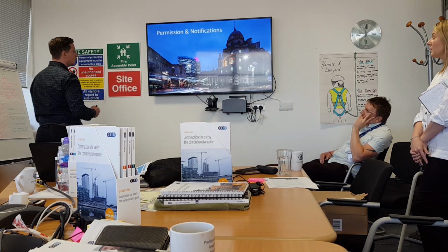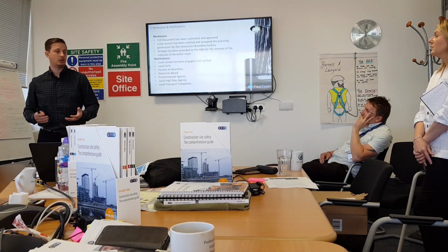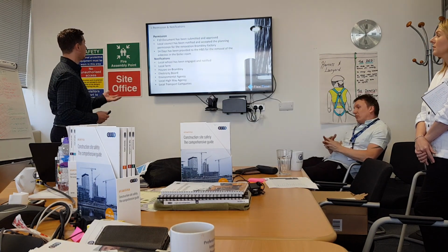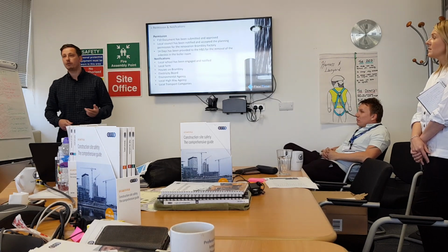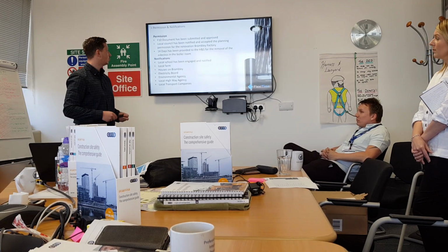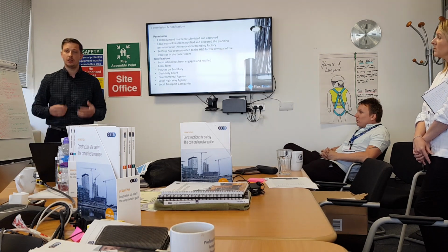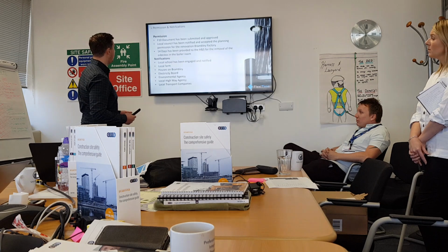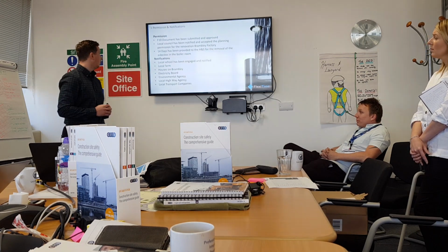Permissions and notifications. Because of the size and nature of the project, it is F10 notifiable. It has been submitted to the HSE and they have approved us to carry out the works. Also on that, the council have been notified for all planning consents. Again, all been passed, and the renovation is to go ahead, as you are all aware.